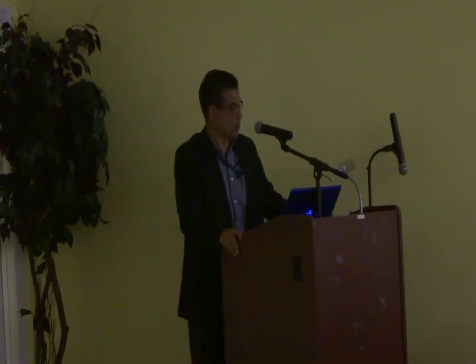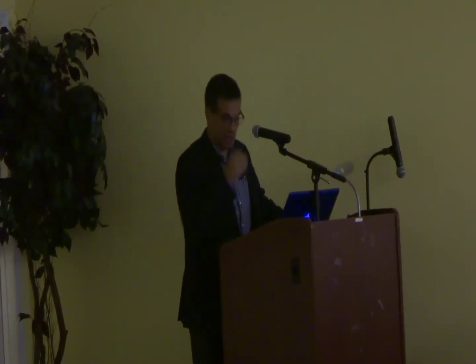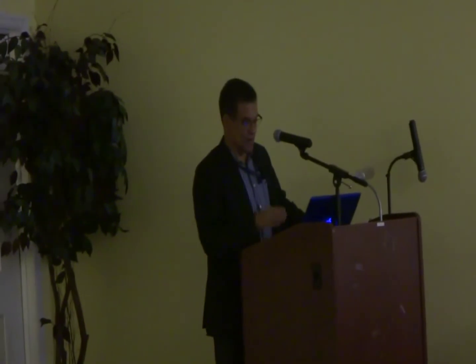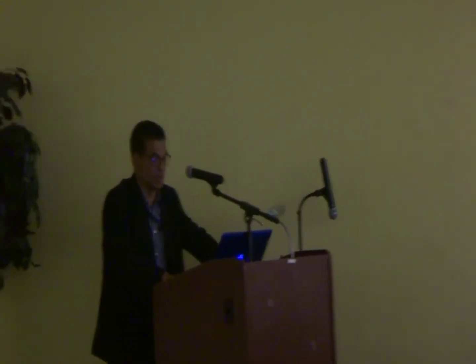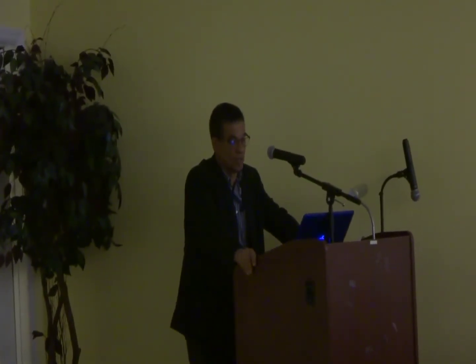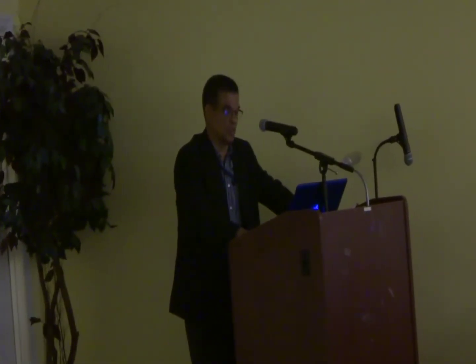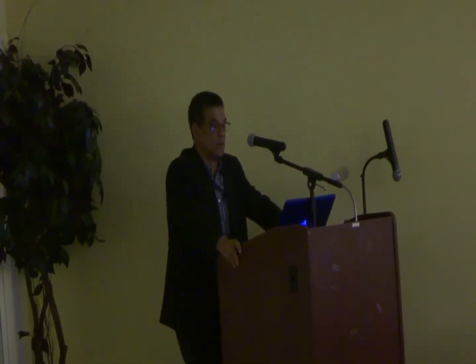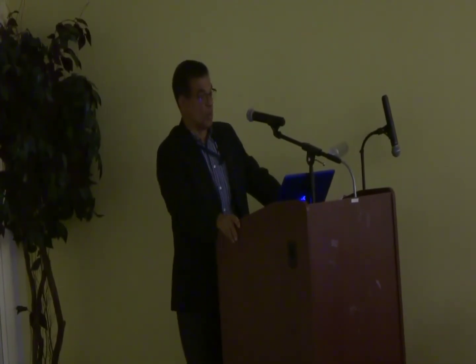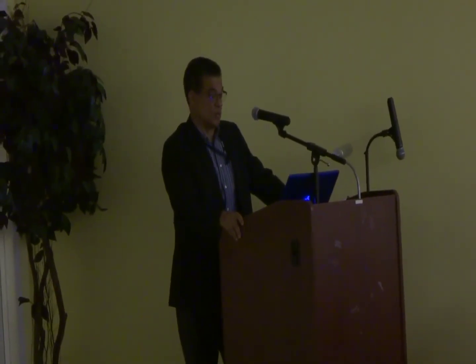So the last section is the tendering procedures. In these tendering procedures, we want to understand the contents of the tender documents as well as some other stuff. The letter of invitation, form of tender, instructions to tender, scope of works documents, drawings and specifications, terms and conditions of contract. Okay? So these are the documents that we use in the ministry.